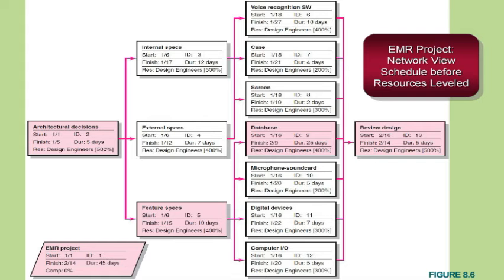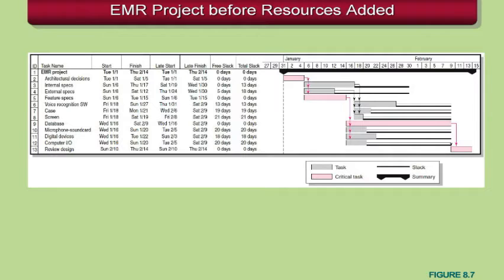So here's our network. Let's take a look at the Gantt chart. Again, you can see in the Gantt chart a little more detail of where the slack exists. We actually identify the free and total slack available as well on any particular part of the activities. So that's what you're going to manage around. You'll manage around the slack and see how much of that you can do within slack. If we can't do our schedule within slack, then we'll have to extend the project date to get the project done. And in fact, those are the tasks and the order in which you try things when you try this within Microsoft Project.